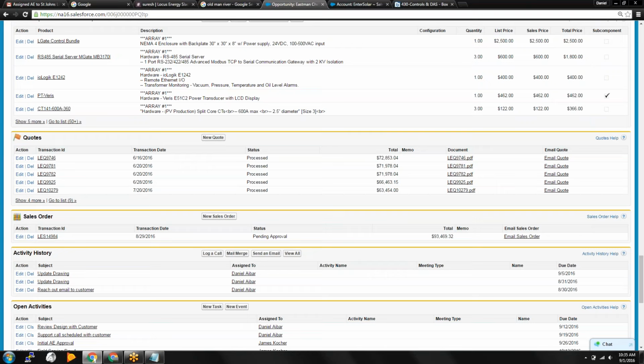Now, after the drawing has been updated and the customer's happy with that, we'll schedule a design review with the customer to go over the details of our hardware. Especially if they're a new customer, this is very helpful for us. We'll just set up a WebEx. We'll go over the design of the project. We'll talk about the various components inside of it. Pretty much what you would expect from a pre-commissioning training.